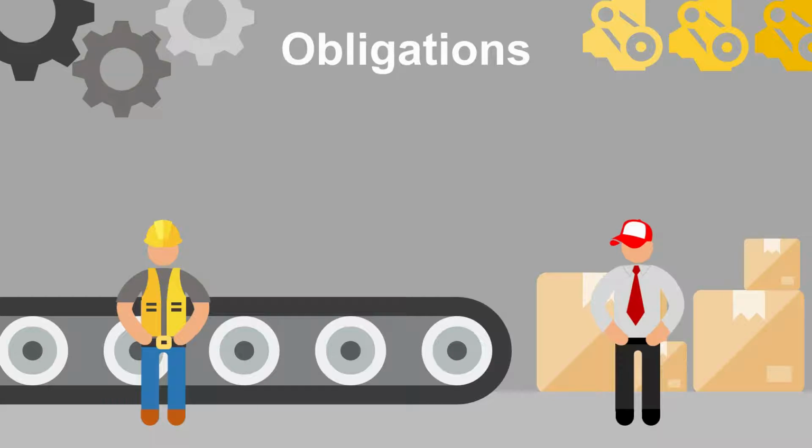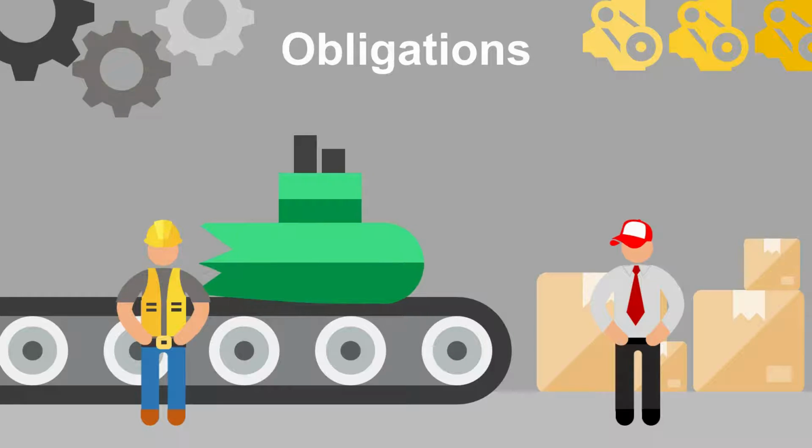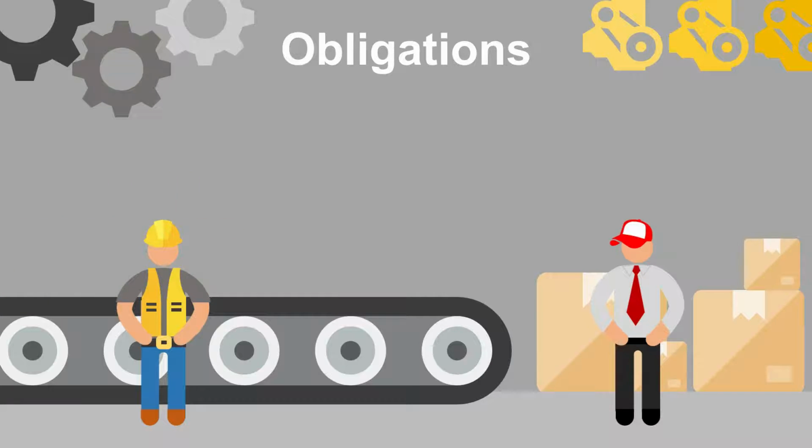And because these products may take several years to produce, if the government didn't account for the expected amount of price change over the construction period, then they would be severely underfunding the production. Because the firm will be expending dollars over several years to build a submarine, the amount of dollars the government obligates must include the amount of price change expected to occur.